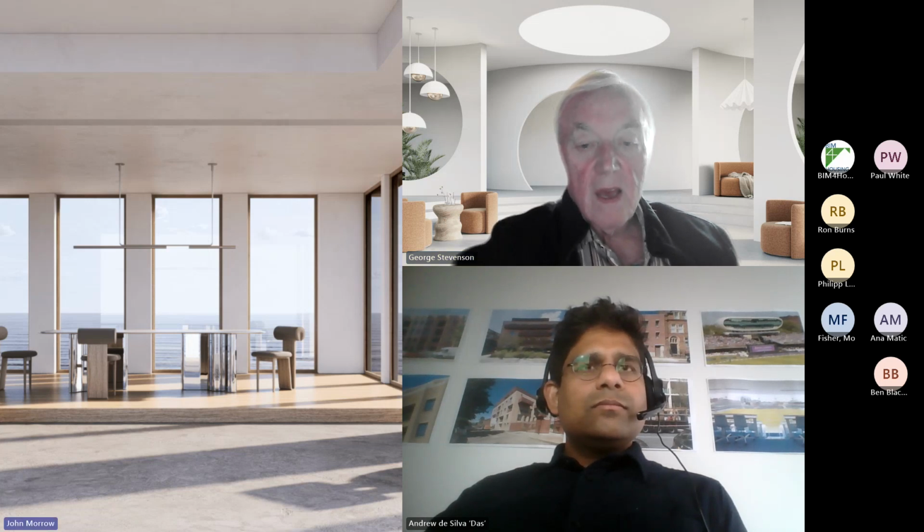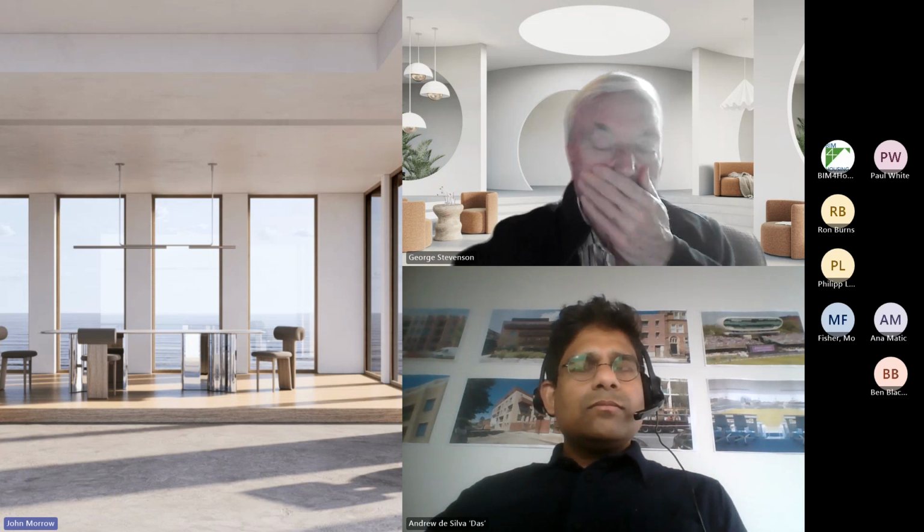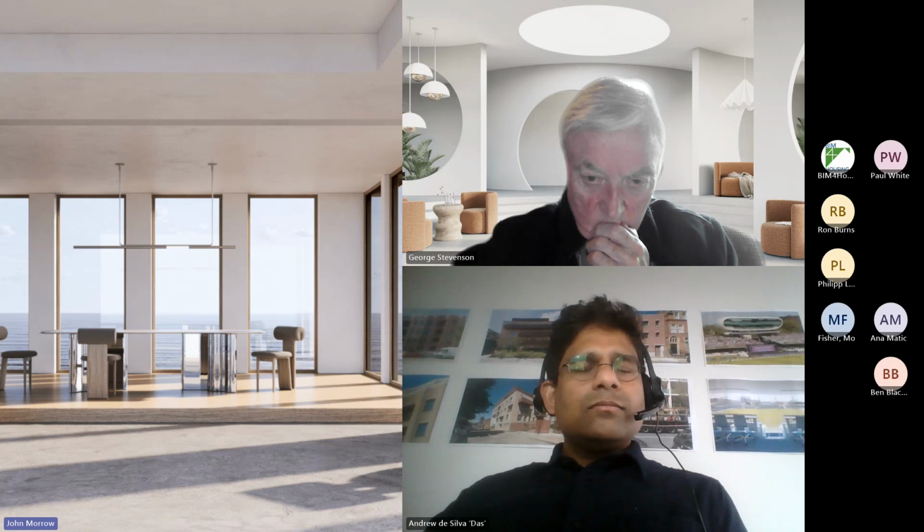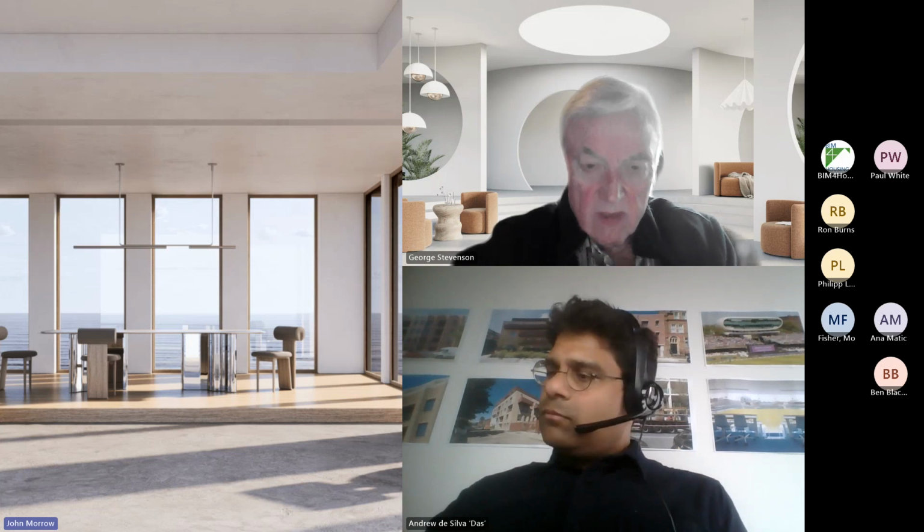Yeah, that's exactly what we do, and that's a key element, that we have a review during the construction phase, during the installation phase, and then all the checks and balances to follow. Because we've had a number of schemes where, as part of the pre-occupation FRA process, we review the fire doors, and we found numerous faults and serious issues with installs. We make that a mandatory practice now on all our schemes, section 106 or land led, it doesn't matter.